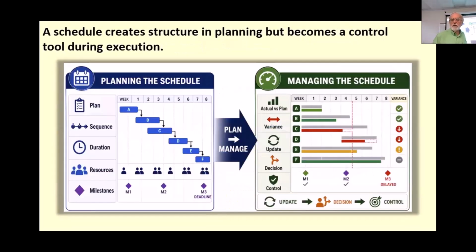Yeah. So a schedule creates structure in planning, but becomes a control tool during execution, as we've been talking about. So it's helpful at this point to distinguish planning the schedule and managing the schedule. During planning, the team builds the schedule by defining activities, sequencing them, estimating durations, assigning resources, and establishing milestones and deadlines. All that work creates a structure for how the project is expected to unfold over time.